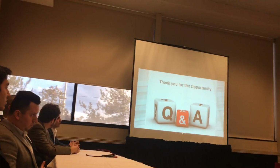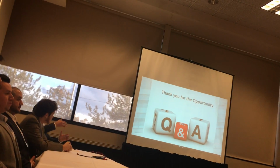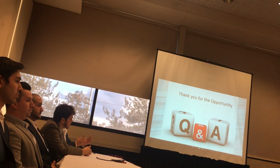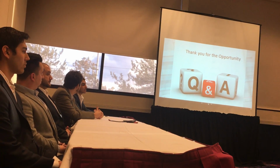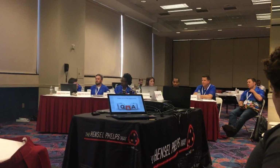Yeah. In addition, we don't really have much space on site, and we're performing this strange pull out of this precast panel instead of a material hoist in this area, bringing in the equipment. There's a lot of risk involved with some of the high quality, expensive materials in this building, and in case anything gets damaged, we want to have that contingency there. No, I think you're right. I'm going in and modifying the building and trying to repurpose it essentially.